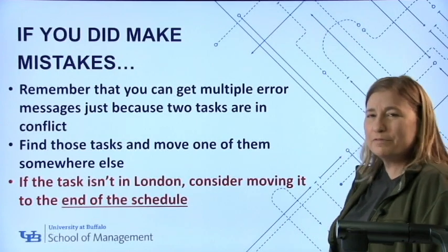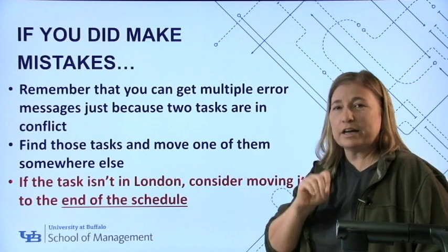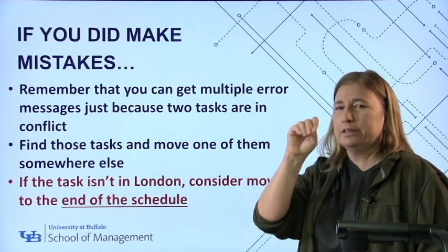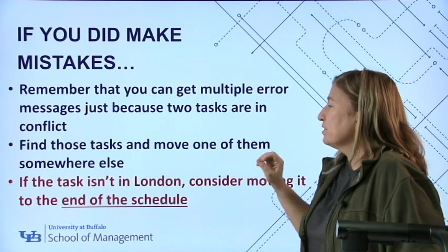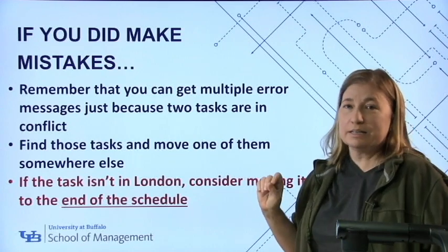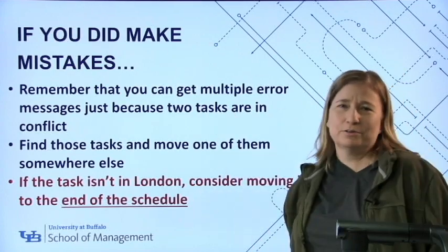Oh, one of my favorite hacks. If the task that you've decided to move, it's like, oh, okay, yeah, I see where they're overlapping, this one's got to go someplace else. If it's a filming task and it's not in London, this is super fast. Move it to the end of the schedule.